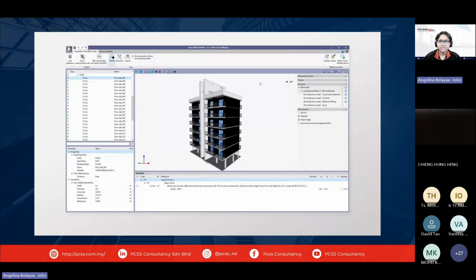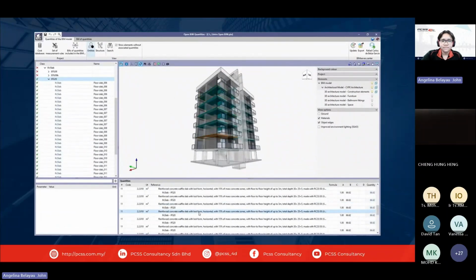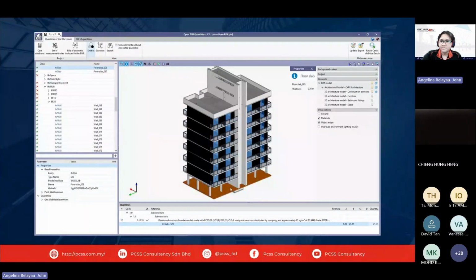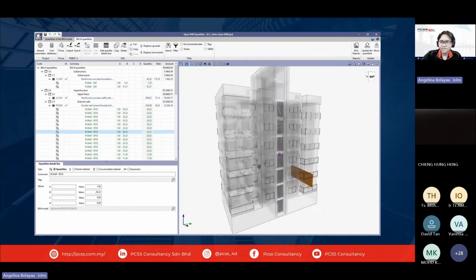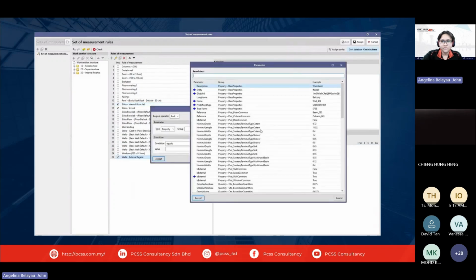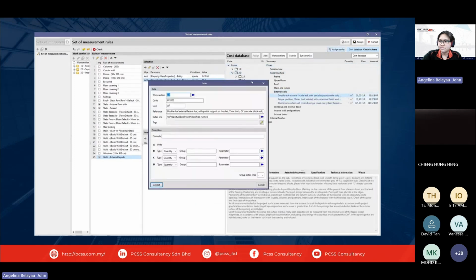Open BIM Quantities is a tool designed to generate bills of quantities from BIM models defined using the standard IFC format. Any measurement rule can be established in order to transform the data contained in the entities of the model into real items for the budget. A series of intelligent rules allow elements to be filtered according to their properties and establish the amount of material that will be used for the collection of quantities of each item.